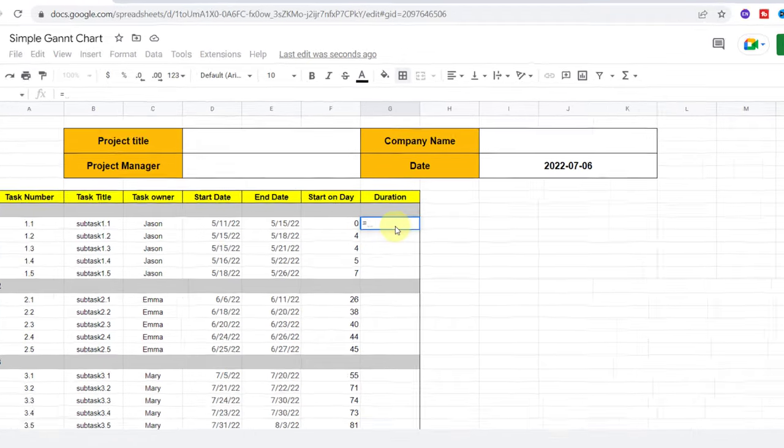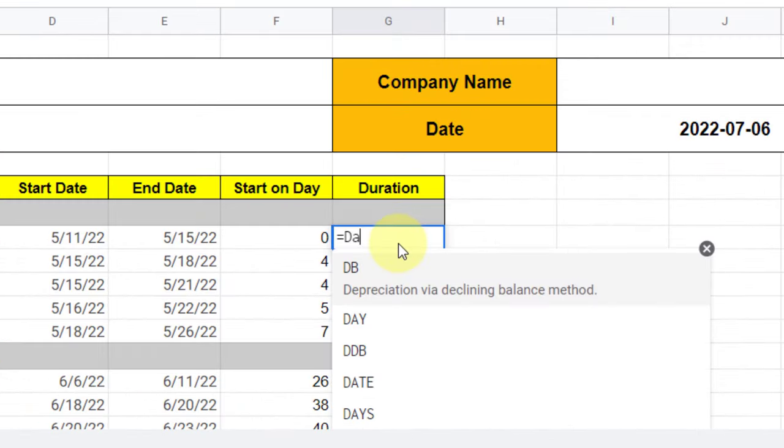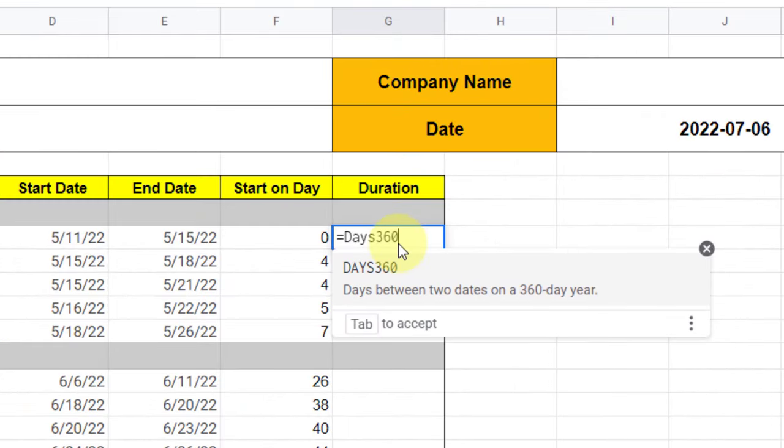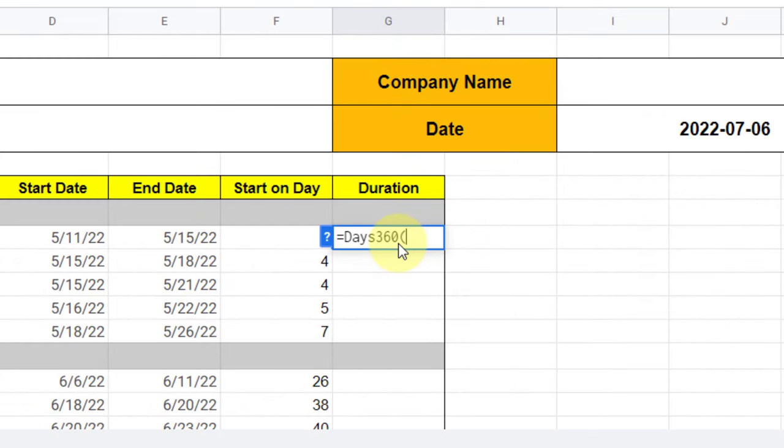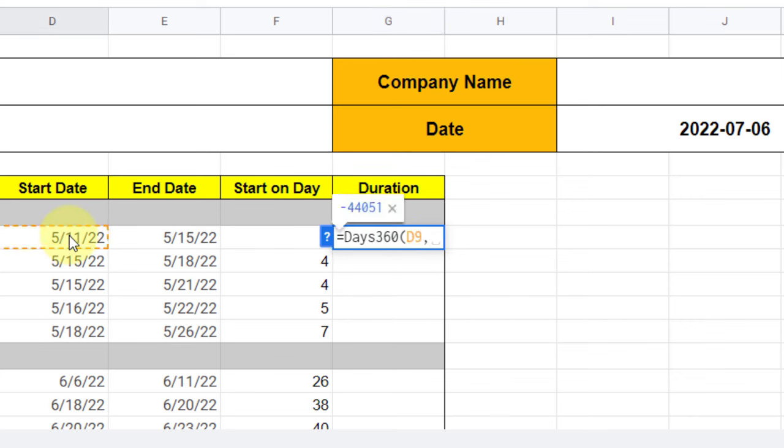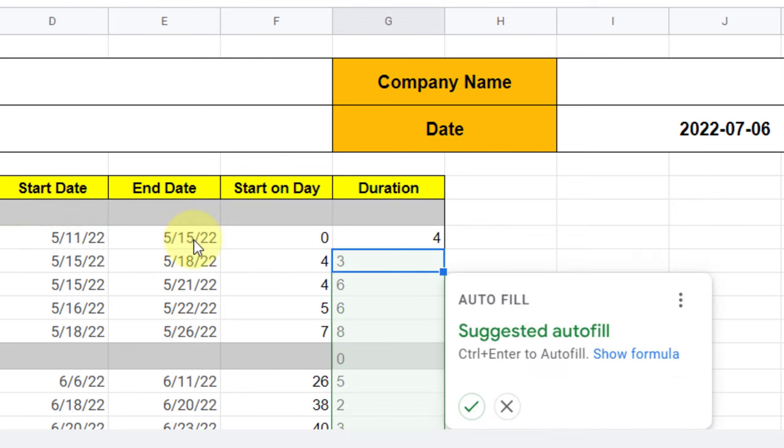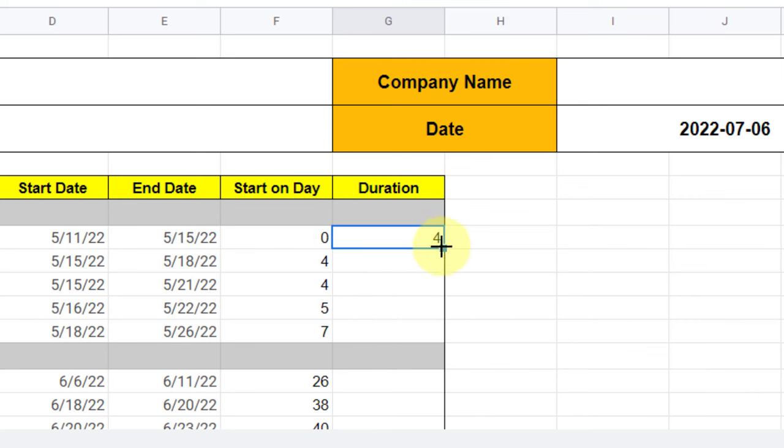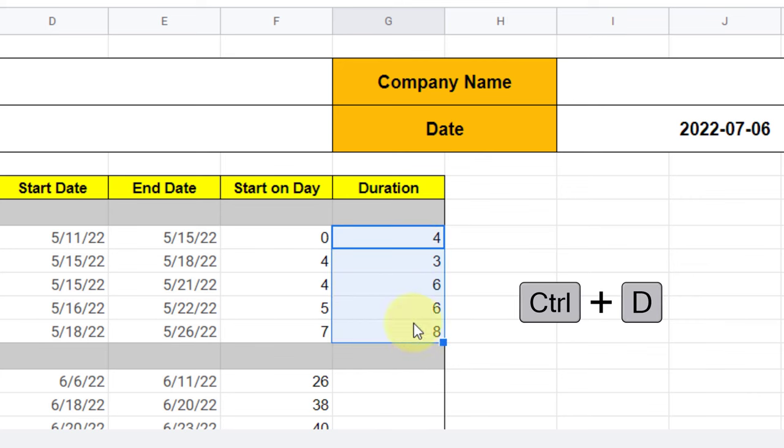Equal sign, DAYS360, open parenthesis, now start day, comma, end date, close parenthesis. As can be seen in my example, the first subtask will last four days. Now I highlight the cells and press Ctrl+D to duplicate the formula for other cells.